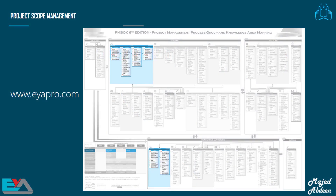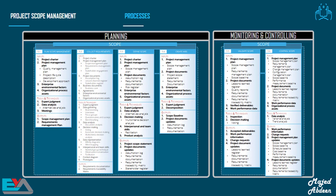Here is our mapping diagram again. Remember to download this from our website eappro.com. You can see the Scope Management processes, which are colored blue. The Scope Management processes are the first processes in the Planning process group, and they are also the first two processes in the Monitoring and Controlling process group. Don't be terrified looking at this — I will explain everything involved in these processes, and you will find them easy to understand.